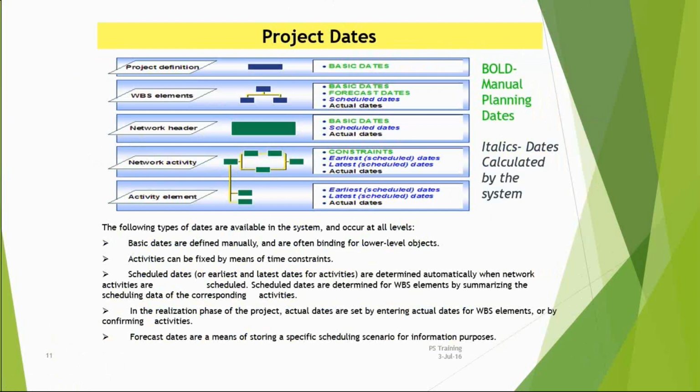Whichever activities come under this path, this comes as a critical path. Whenever those activities get started, as a project management professional we have to make sure the activity gets completed, and we have to start on the same date. If there are any little disturbances on this particular path, then the entire project will collapse in time. Okay. Yep. In the time factor.